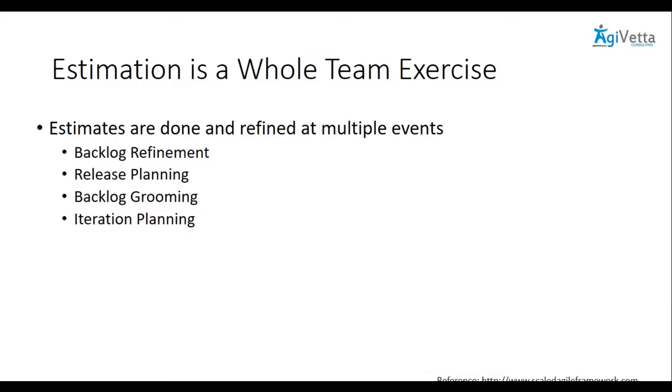Now this estimate is just on the face of the story. You look at the story, the team members, maybe not all of them, some of the team members can just look at the story and commit to the product owner: this is the timeline by the end of which we can deliver the story or the set of stories or the feature, etc. But they're still not sure because they have not understood the full requirement. There might be a lot of questions. Now the team is involved, the grooming is done, it becomes even more clear.